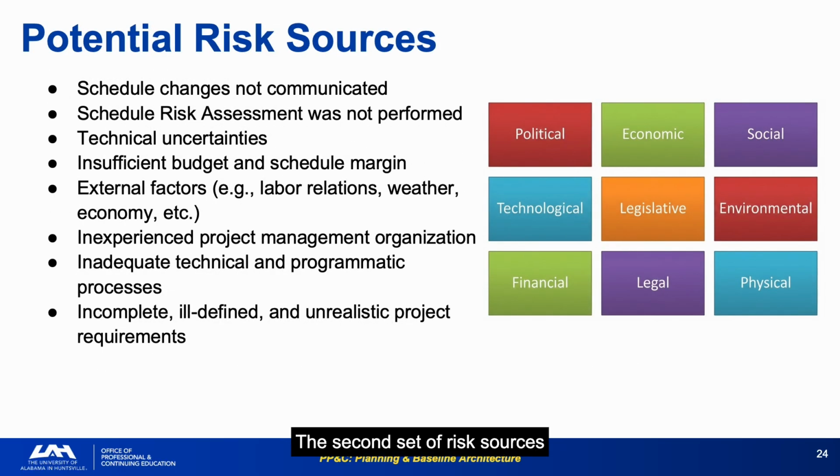The second set of risk sources includes process failures, external factors, and organizational weaknesses, categories that are harder to quantify, but often more damaging than technical risks. Inexperienced project management organization and incomplete, ill-defined, and unrealistic project requirements are the root causes I've seen most consistently in programs that fail at PDR or suffer major FACE overruns. Schedule risk assessment was not performed is itself a risk. It means the program is committing to a schedule without understanding its confidence level, which is exactly the condition the JCL requirement is designed to prevent.